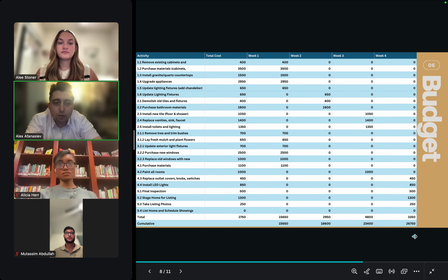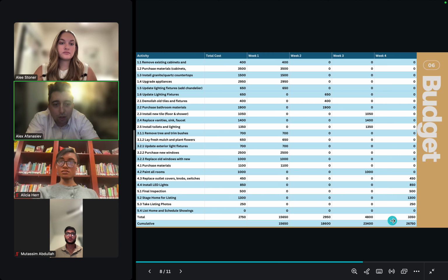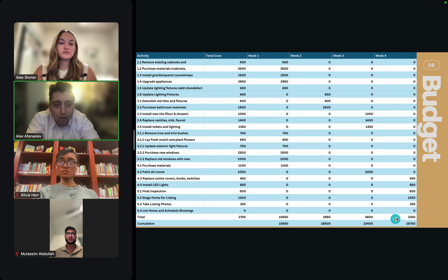Thank you, Muta. So as far as our budget is concerned, we have 4 weeks to complete this project, and after those 4 weeks we are estimating a cost of $26,750 for all project tasks. Basically, this structure is broken down into 4 weeks, and within those 4 weeks we have a total and a cumulative. So after each week we can see the total and then the cumulative amount of the project, how much the project will cost for each week.